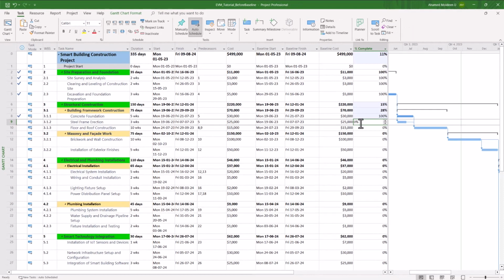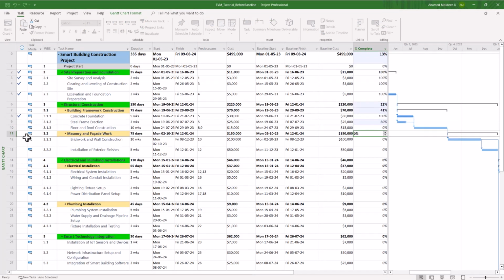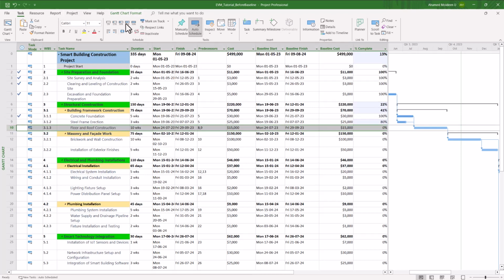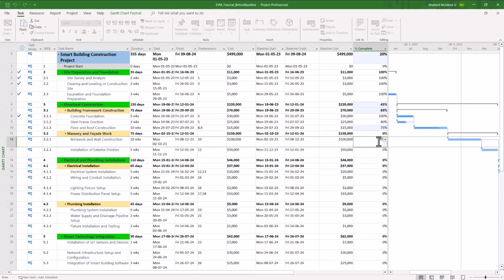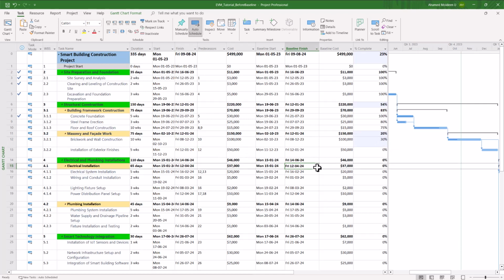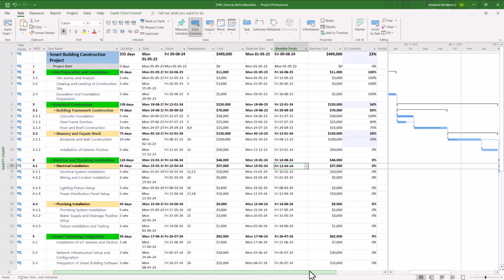And here I'm going to put that we didn't complete this work. Let's say we have done only 80% of it, and this one 75%, not fully done, and this one we started on 2nd of October. We have done, let's say, 30% of the work, because the due date is December 8th, so we had to complete about 1.5 months of work. So let's put 30 here. Yeah, so we are done with the schedule information.